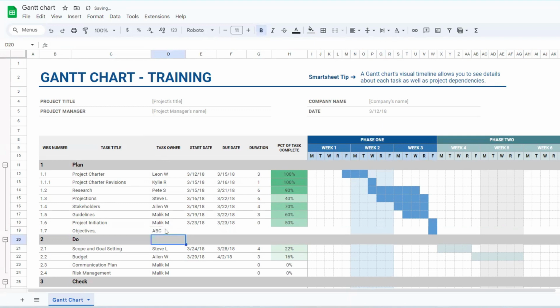Let's say the action owner is ABC. And what is the due date? Let's say the due date, we're giving it something like this. Okay, copy this one and paste it here. Or what I will do, the end date of this, let's say this task may require 2 more days. So I will just use workday, and then I'll add a couple more days to it, right? What it has done, it has skipped 24, 25, 26, 27, a couple of days, which are weekends, right? So that is automatically handled, and then duration also you can calculate.